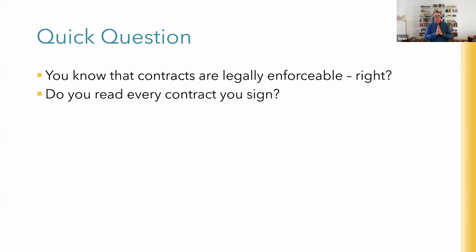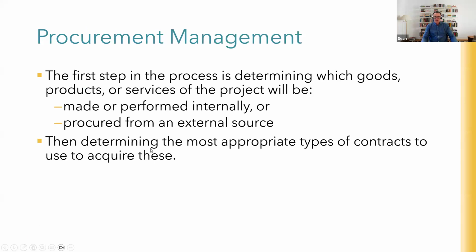Now, when it comes to the workplace, you have to read all the contracts, and you have to read them regularly. Don't just read them once. I have a policy that if I'm subject to any contracts, I'll read them monthly, so I'm aware of them, because you always forget particular terms about performance or termination or anything else like that. So please do read them regularly.